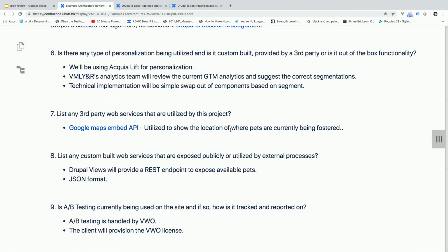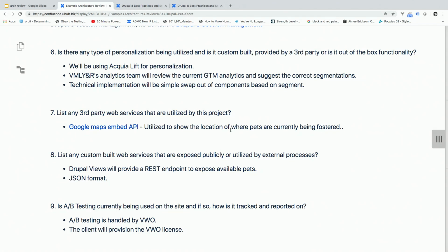So when we start talking about personalization, a big thing that we're looking for is who's actually doing this segmentation. Has anybody here done personalization? Okay, so you probably know the technology part is easy. It's if-else statements. There's nothing else to it. There's a little bit more to it, but that's basically it. The hard part comes in somebody actually going through the analytics layers, finding these segmentations, tagging the content, telling us what the content needs to be tagged as, things like that. So it's a good thing to call that out to make sure up front that somebody's thought about that. Because every client I've ever talked to thinks it's a magic black box that we push a button and it's personalized content. It's not how it works for us. So we just want to call out all the things that we're doing there.